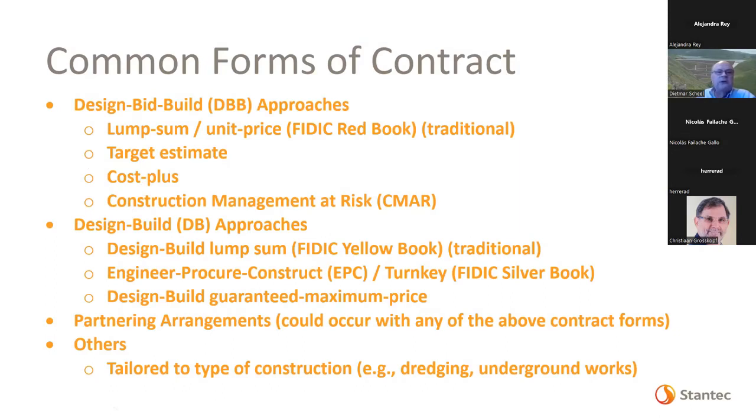The second group is design build approaches. That's the one you're going to be more interested in, especially the FIDIC Yellow Book or forms of contract like that, traditionally used for transmission lines and powerhouse works, basically anywhere where you get a lot of electromechanical work. There are other variations of design build approaches as well. I'm not going to dwell much on partnering arrangements in this seminar.